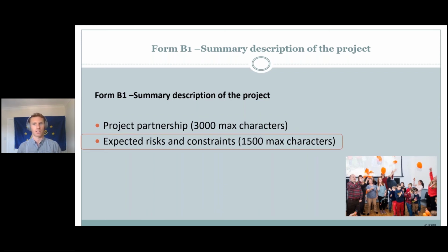And expected results and constraints. This section should examine the main constraints, i.e. limitations and restrictions and risks that might occur during the project. For example, if an action depends on the purchase of land and the purchase cannot be made, could the land be leased instead? How might these be mitigated for? And what overarching strategy for mitigation might be implemented? So if you have any questions, please remember to use the question function or contact us at a later date via the helpline or NCT inbox.